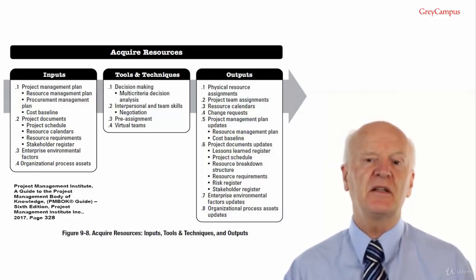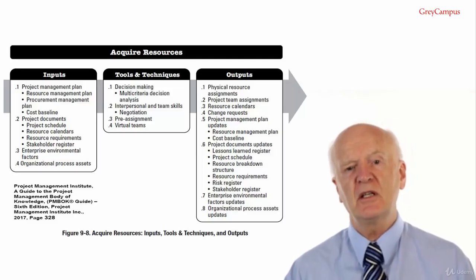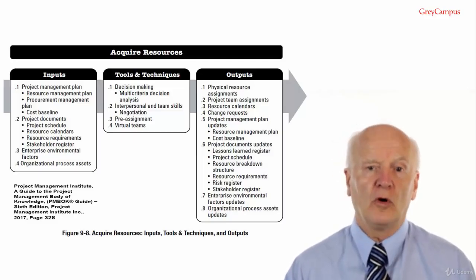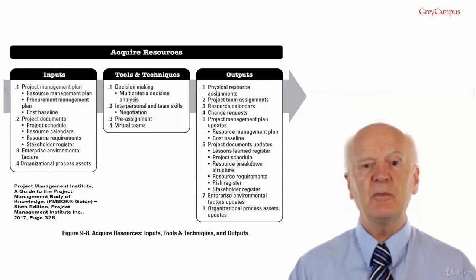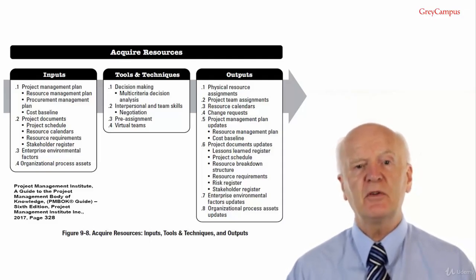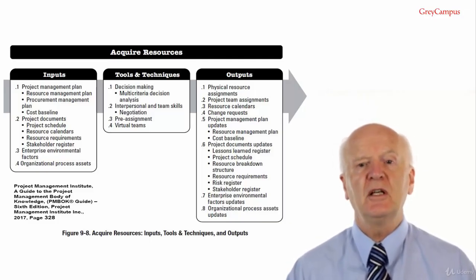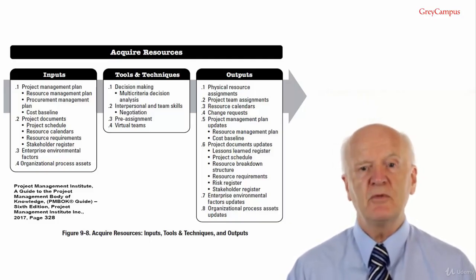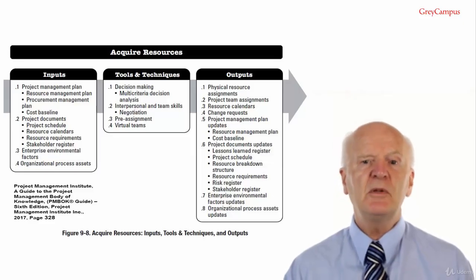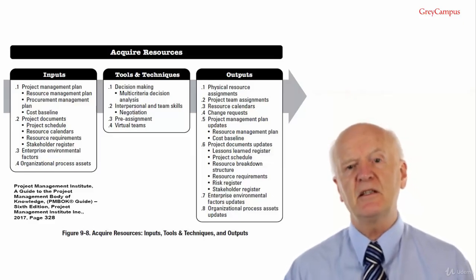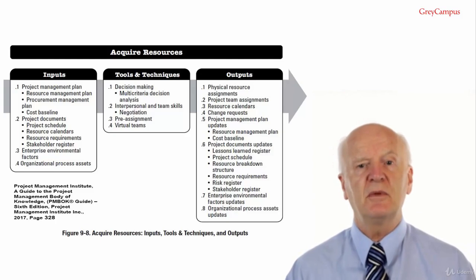A resource calendar identifies the working days, shifts, start and end of normal business hours, weekends, public holidays and when each specific resource is available or unavailable. Information on such resources, such as team resource, equipment and material, potentially available during a planned activity period is used for estimating resource utilisation.